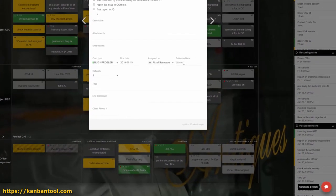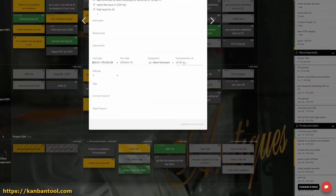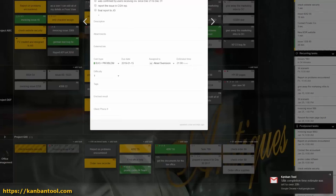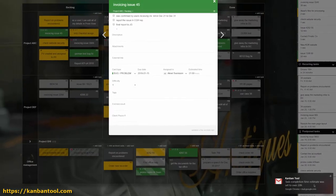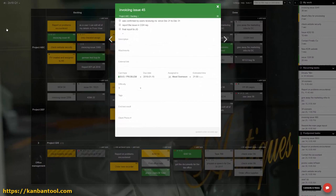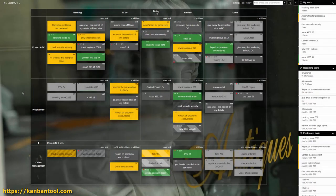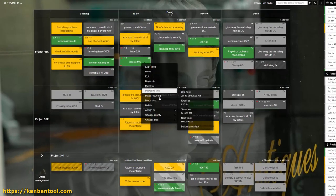You can create an automation rule by which the manager will be notified when someone estimates a task to take more than 20 hours. Knowing this right away gives the supervisor an opportunity to check why there are so many hours, whether any help is needed, or is the job actually planned in a sensible manner.